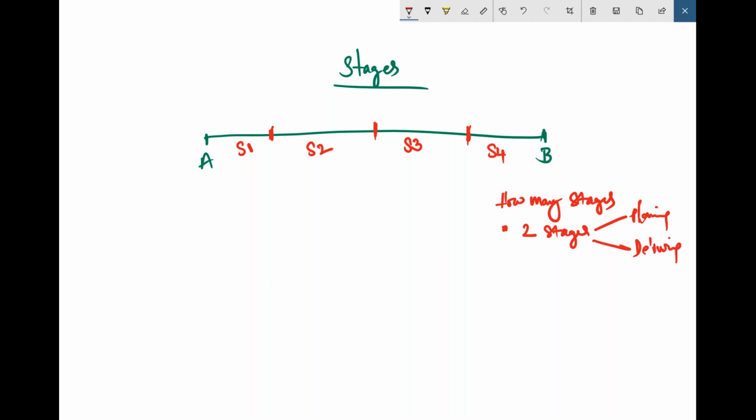So there should be minimum, please understand, it is not like 2 stages. There should be minimum 2 stages for a Prince2 project, and there can be n number of stages according to the complexity of the project. So minimum 2, maximum is something which Prince2 didn't define. Okay, that's what is about how many stages should be present in a Prince2 project.